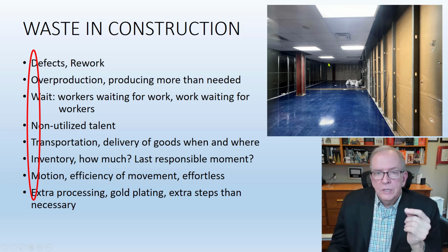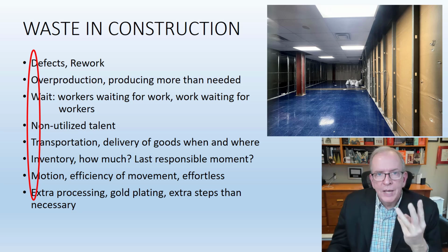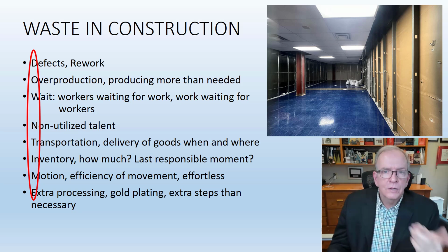The other question is, looking back at that schedule, we've got 3 different floors. It might make a lot more sense to have 3 deliveries for those materials instead of 1 big delivery, 1 for each floor. And if the floor is huge, you might even want to consider 2 deliveries per floor.